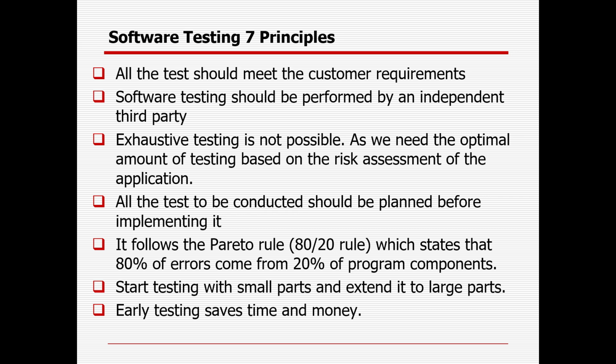Early testing saves time and money. As and when you start testing from the requirement phase, you are able to discover all the defects and bugs, and they can be fixed at the earliest stage, so that overall it saves time and money. Because in case you identify the defect at a later stage, definitely the cost of fixing those defects or bugs will be more, and there are high chances that your project will be delayed, it will involve more cost, and it will take additional time, and you will not be able to manage your deliverables or the timeline.